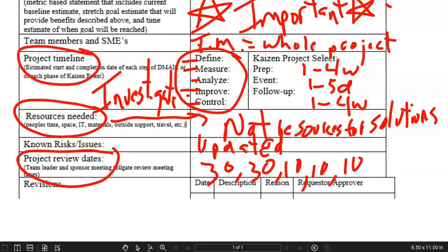So if my sponsor is hoping for the solution plan on their desk in 100 days, I will try to set up toll gate review dates at the end of 30 days, the end of 60, 70, 80, and so on. You get the idea. By doing that, it forces the sponsor to carve it out in their calendar, so you're not introducing idle time waits while trying to calendar an appropriate time to meet with sponsors. Get that nailed down right away.